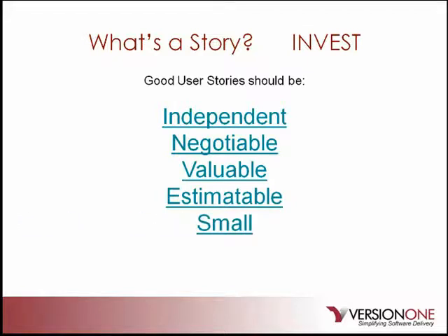So user stories should be small, not too small, but not too big. And what we mean by that is a user story should be able to be completed within an iteration. That's what we mean by not too big and not too small. And finally, user stories need to be worded in a way that's testable. In other words, not too subjective, and to provide clear details of how the user story will be tested.